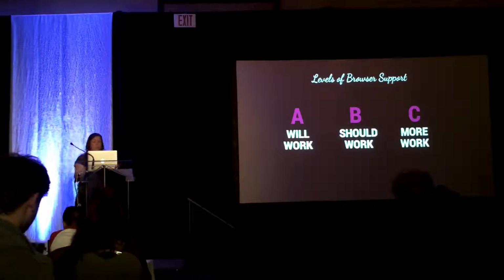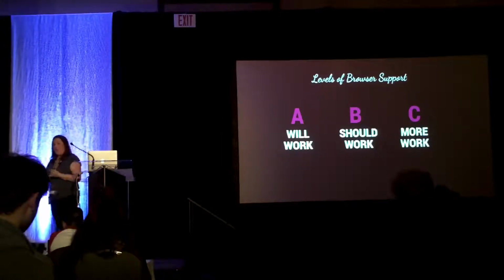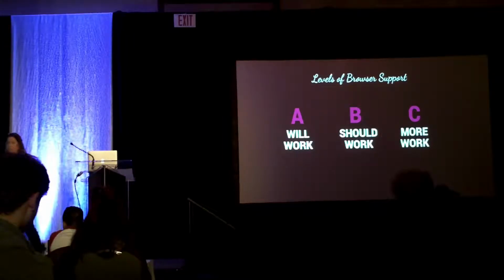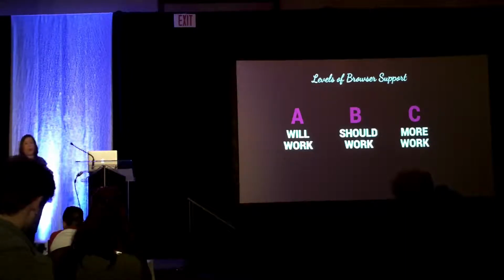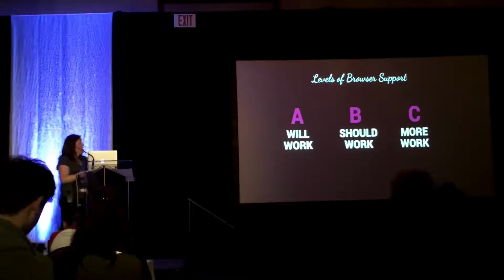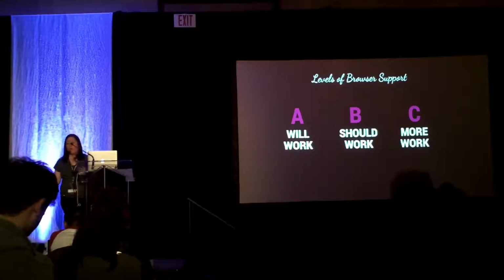So that way, if you start kind of outlining your browsers that way, you know exactly what the expectations are. Like, these are the ones we're going to cover. So, Firefox, latest version of IE, Chrome, mobile, go across the board. Don't ever list devices. And then here's the ones that should work. And then here's the ones that require more work.